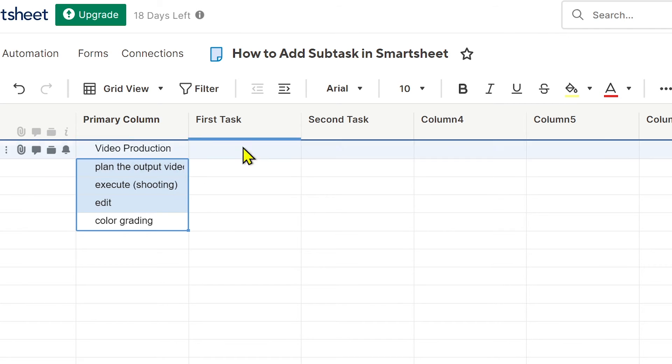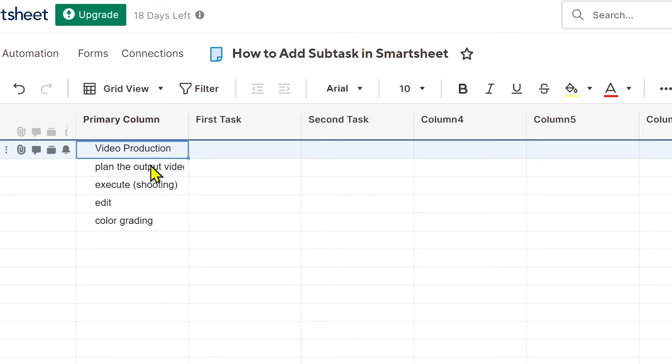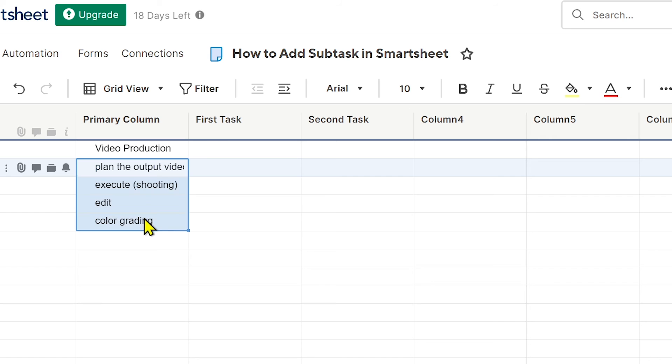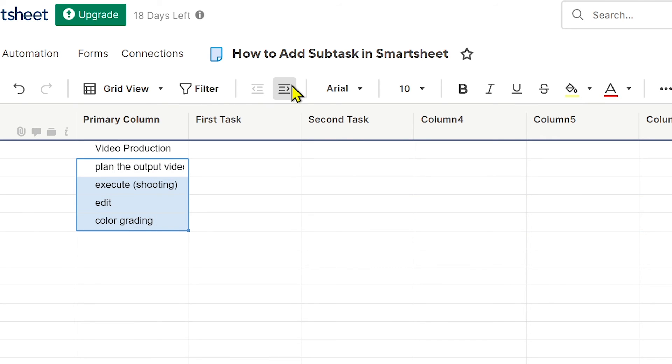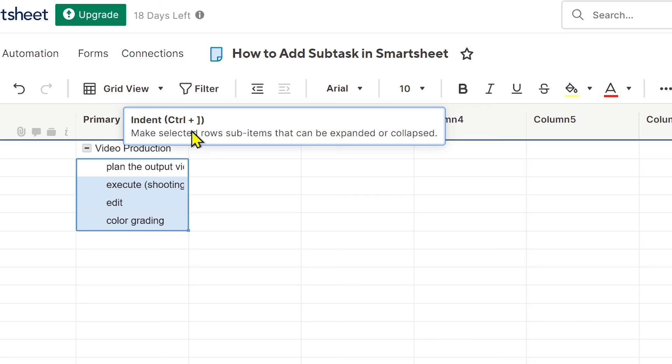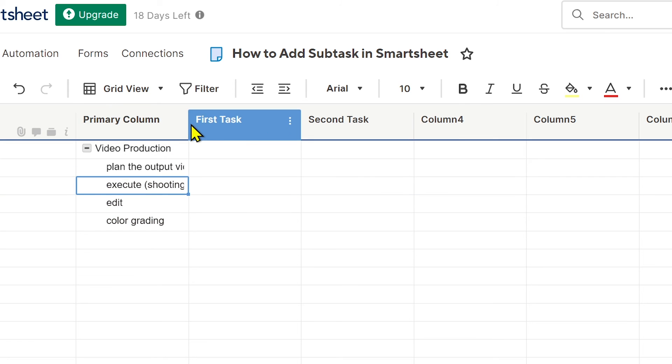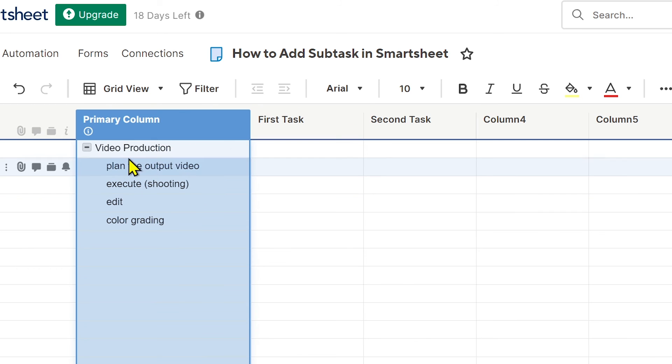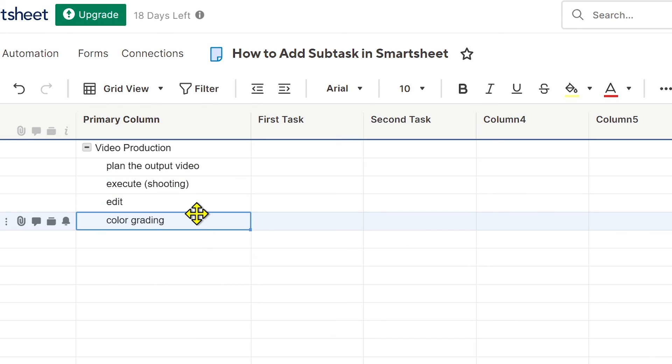Now what I'm going to do in order to add this as a subtask to this one here - this is going to be our main task - is basically use the indent function. You're just going to highlight all the subtasks and you're going to click this one here. Now you can see that they are dependent under Video Production.